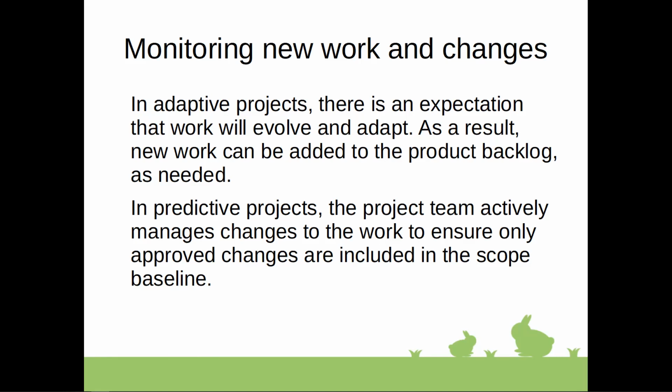In case of a constraint for the schedule or the budget, the product owner may consider that the project is done when only the highest priority items are delivered and the rest descoped from the final goal for the adaptive type of project. In a predictive project, since the goals and schedules are more final compared to an adaptive type of project,